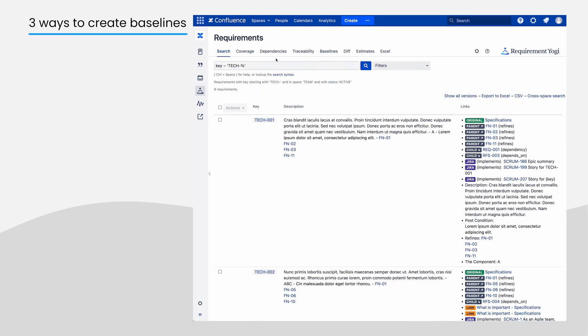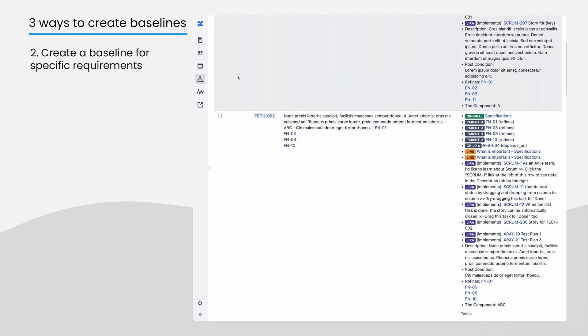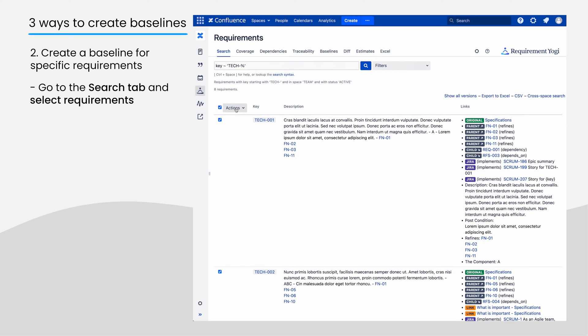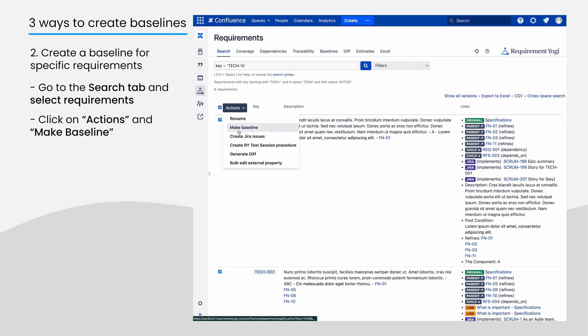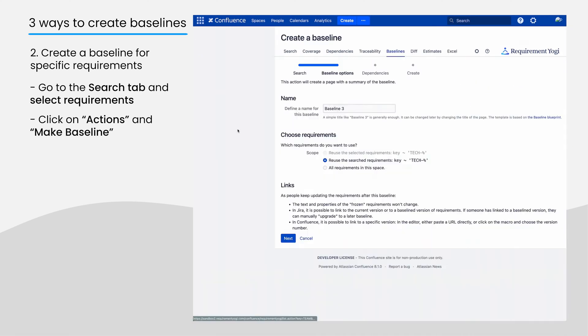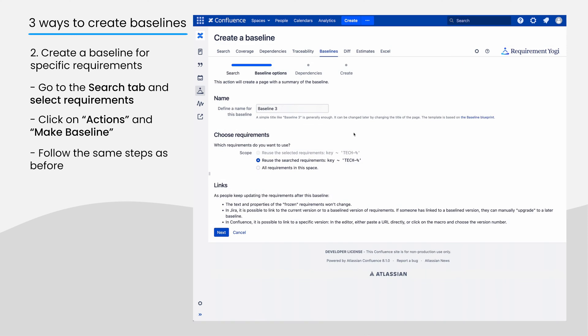To create a baseline for a subset of requirements, select them on the search screen, click Action, Create Baseline, and follow the same steps.